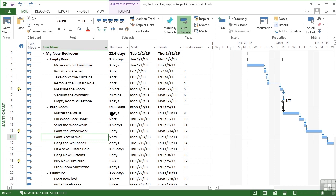So it's going to take three days to plaster the wall. But then we're going to need to allow the room at least three, possibly four days for the plaster to dry. So at the moment, there isn't a direct link between paint the wall and plaster the walls. We just effectively follow on. We're going to plaster walls. We're going to fill the woodwork. We're going to sand the woodwork. We're going to paint the woodwork. Now we need to add in another relationship.